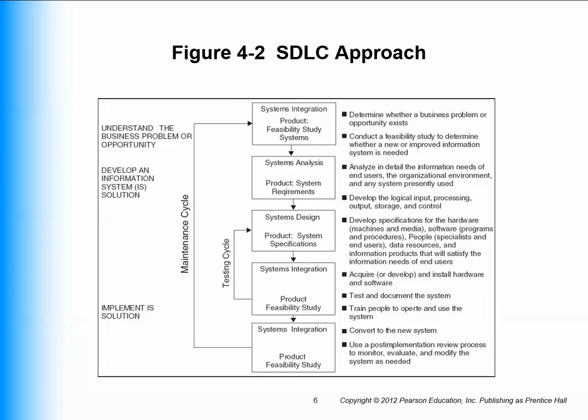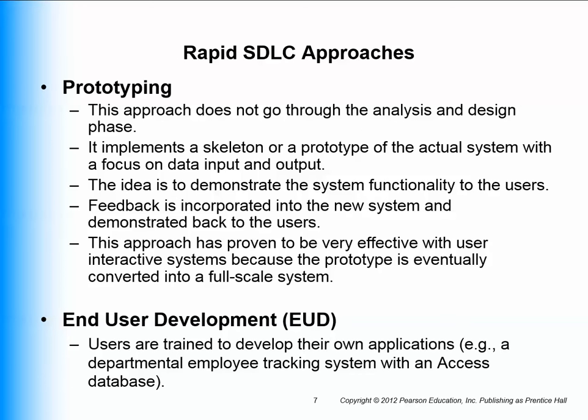For example, if you look at this diagram, what happens if you get your specifications in place, design the system, only to find out that the specifications have changed? Well, a rapid prototyping approach is one way around this. If you do small, it mentions here skeletal prototypes that really just preserve the look and feel of the system. They're not integrated with all the modules, they don't completely work, but it helps communicate the idea. Here's what we think you wanted in your requirements. Here's what we think we need to do.